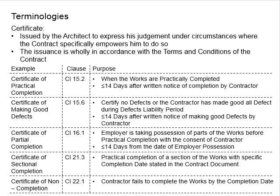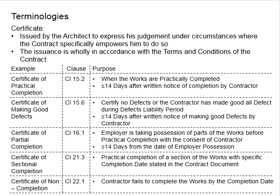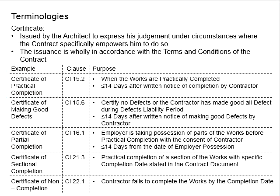However, if the employer wishes to possess part of the work, the employer will have to wait for the certificate of partial completion, and that particular completed part of the work will be handed over to the employer. From then, the defect liability period starts for that particular section. This certificate of partial completion will need to be issued by the architect within 14 days of the date of the employer's possession. Theoretically, without the certificate of completion, the employer cannot occupy the building.